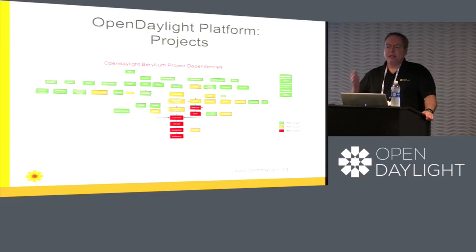We do this so that we can stage our release process, so that as features are first verbalized during the early parts of the release process, the offset 0 and offset 1 projects can say what they're going to provide. Based on what they provide, offset 2 projects may choose to add or not add a feature because it would be dependent on something that would be new in an offset 0 or 1 project. So that way we can keep everybody informed, the dependencies in line, and throughout the release process have things ready for things that are going to be dependent upon later in the cycle.